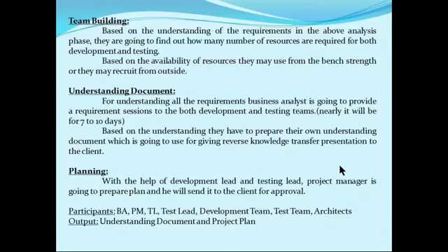And finally, planning. What is planning here? Once everyone has knowledge, once everyone is ready with the knowledge of that project, then the leads will prepare their own project plans. For the testing team, one plan, for developers, one plan, and they'll send that plan to the client and the client should approve. Finally, the process will start. The participants here are business analyst, project manager, team lead, test leads, development team, testing team, architect. Finally, the outputs we get are a very good SRS documentation and a very good project plan.